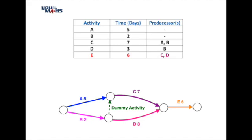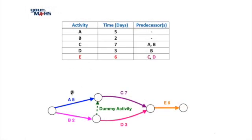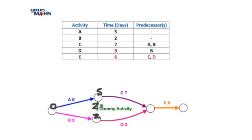Now let's look at how we find the critical path using the dummy activity. To determine the critical path we start on the left-hand side node at zero days, placing that number at the top of our circle. Moving left to right, we have one arrow coming into the bottom node and two arrows coming into the top node. The bottom node has only activity B coming in, which takes two days. Coming through the dummy activity there's no extra time, so it's still two days. Activity A takes five days and because that's the longest time, five days is the earliest we can start activity C.